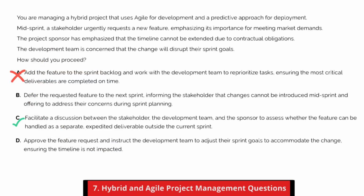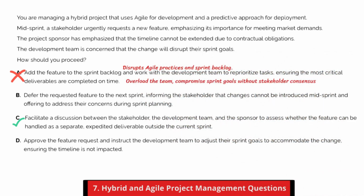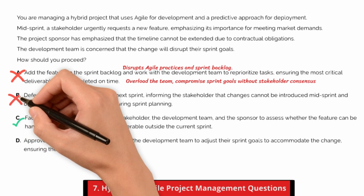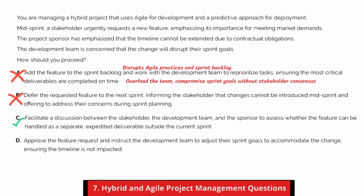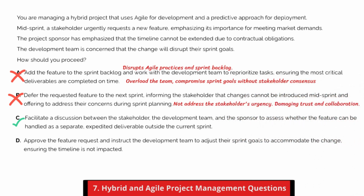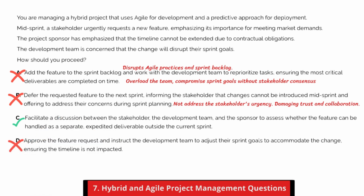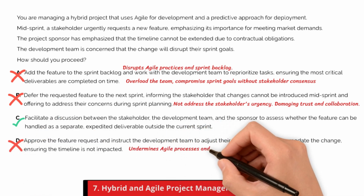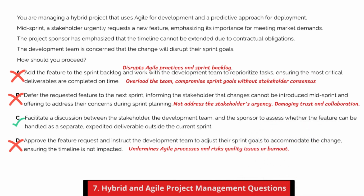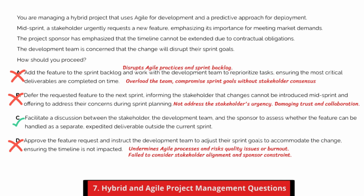Option A. While reprioritizing tasks to accommodate the change might seem proactive, it disrupts Agile practices of maintaining a stable sprint backlog. This approach risks overloading the team and compromising sprint goals without stakeholder consensus. Option B. Deferring the feature aligns with Agile principles but may not address the stakeholders' urgency or demonstrate responsiveness to their concerns, potentially damaging trust and collaboration. Option D. Approving the request and forcing the team to adjust mid-sprint undermines Agile processes and risks quality issues or burnout. It also fails to consider the broader project context such as stakeholder alignment and sponsor constraints.